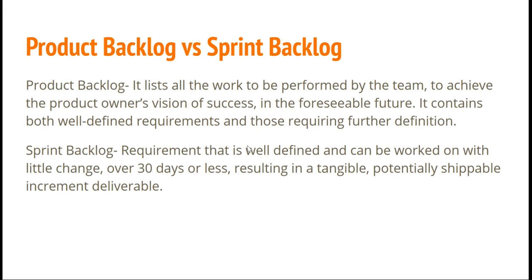While on the other hand, sprint backlog is the one that has all the requirements well defined and can also be worked with little change over 30 days or within a sprint time. All the items that we have in sprint backlog are always targeted for delivery.